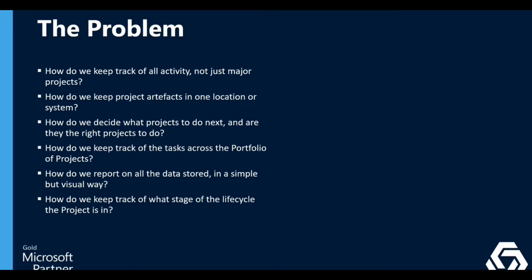So yeah, and I guess governance and life cycles. Again, harping back to my first job in projects as project support officer at Welsh Water, as I said, I'm sitting there with an Excel spreadsheet, and my Excel spreadsheet is my gate checklist, and I'm saying to the program manager, who's got 20 years more experience in this stuff than me, "Nick, have you done your business case?" "Yes, Joel, I've done my business case." "Nick, have you done your comms plan?" "Yes, Joel, I've done my comms plan." Have you assessed your risks? Have you done your finances, agreed the capex and the opex budget? "Yes, Joel, I've done that." "Right, okay, well, Nick, you can go from discovery to alpha, or planning into design." And he's like, "Right, thank you."